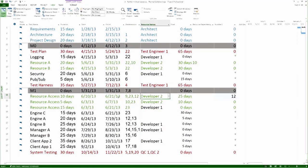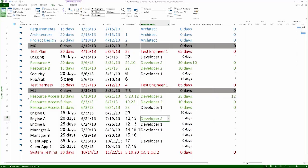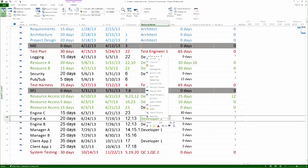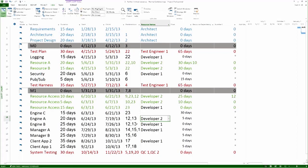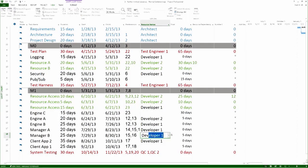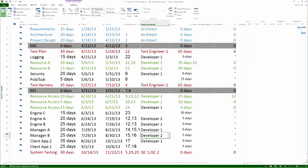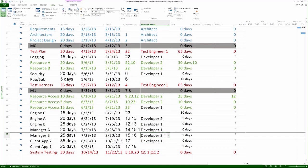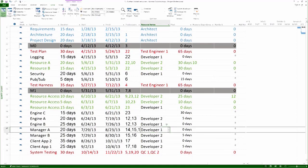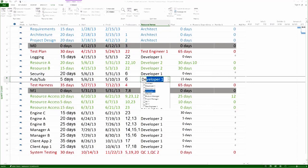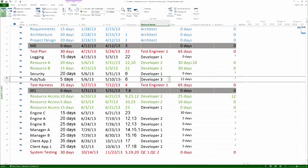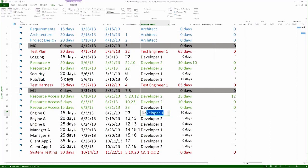Let's finish assigning developer 2. Developer 2 is popping back on network on 6.21. Look around 6.24. We have this activity with five days of float. Let me also just fix the color here. Let's just do it this way. And then developer 2 is popping back on the network on 7.19. We have a little bit of downtime for developer 2 in that case, but we can pick up this activity over here. And then we have the ability of doing the activity at 9.2. And developer 2 is done with this network. All we can do is plug the rest of the resources over here. We can use developer 3 at 5.10 and long downtime and then developer 3 can come over here. And now the project is fully staffed. So you can see how you use float to assign resources.